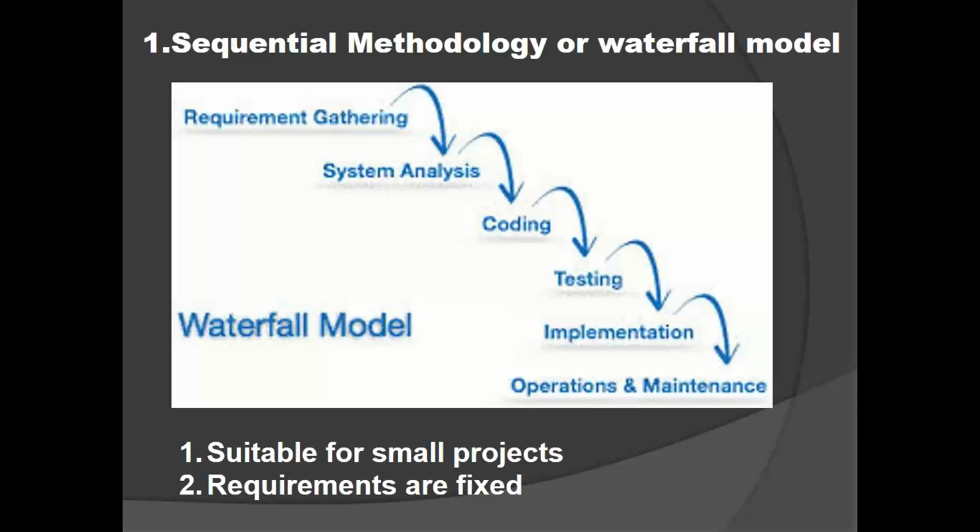So we will do review. If review shows everything is fine, then we will go to next phase. Or if review says that there is some problem in that particular phase, we will solve that problem and then we will go to second phase. And again we are going to complete the second phase, and again we are going to have a review process.